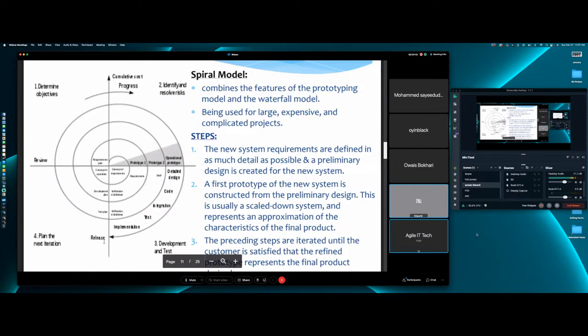So the second prototype has a better version of 1, 2, and 3, plus 4, 5, and 6 added on top of that. Agreed? Then this time business again has the chance to review 1, 2, 3, 4, 5, 6, and give us any kind of feedback on 1 through 6. Plus we will work on 7, 8, 9, and 10. You got it?